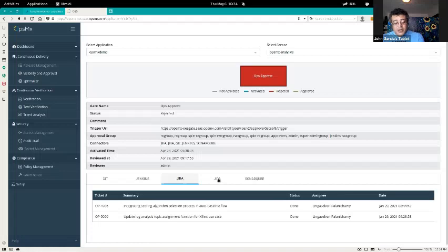A lot of folks use Jira, for instance, to track the approval process, where as a product manager, I would submit a ticket, and then as a developer, I would work on the ticket. And then when folks are satisfied it's ready to go, a product manager or a release engineer, who's the only person allowed to move that ticket into the required state, will do that move. And so then, as a reviewer who needs to decide on the disposition, I can see if that status is done or in the approved by manager state that it needs to be in to get to the next level.